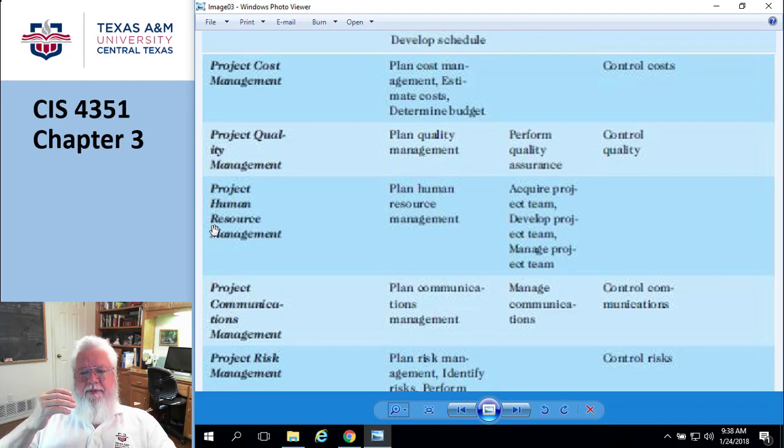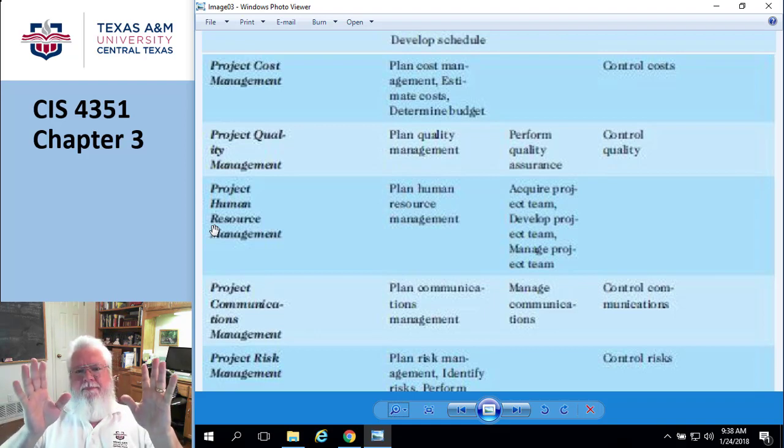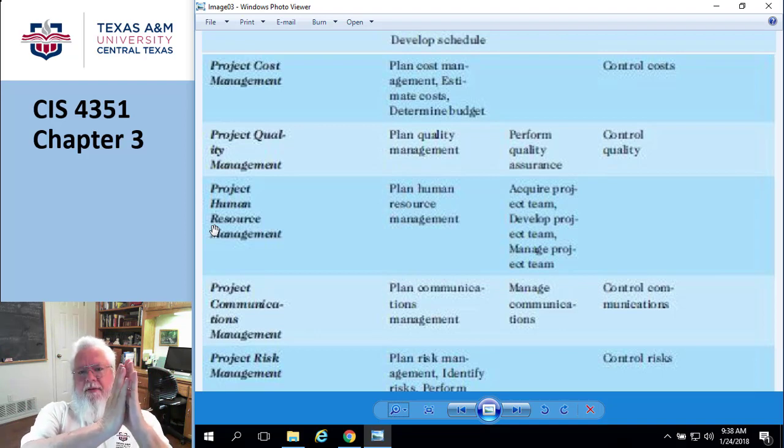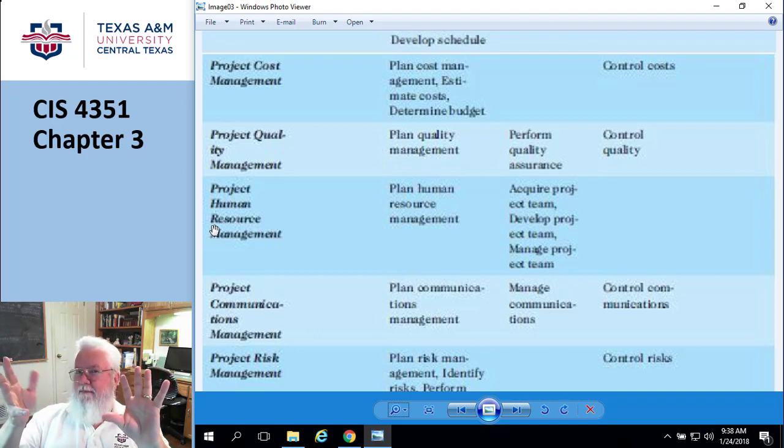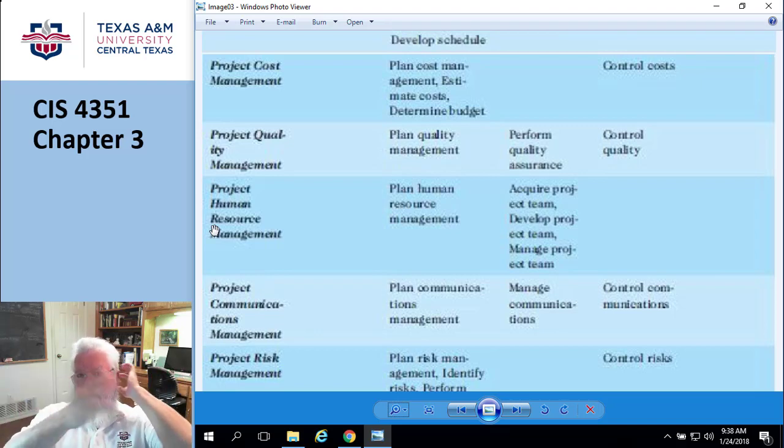Okay, cool. So Agile is the adaptive development technique, and it also has an interesting thing in that it tends to produce multiple versions of something. So instead of having a long period of time with nothing and then presto you're done, in Agile you get version A, version B, version C, and then you get done. So you actually have 4 different versions of the same product by the time you're done. Of course, you typically throw away the old ones, but you get the point.